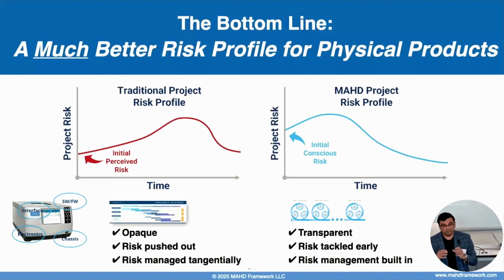And so all of those discussions happen. Trade-offs. Generally, integration tends to happen later on. You might build an alpha prototype, but typically it's a full-blown prototype of the entire system. That's the first time that the team starts integrating the whole piece. And that's the challenge. You find the hard stuff later, and then you have to make trade-off decisions.